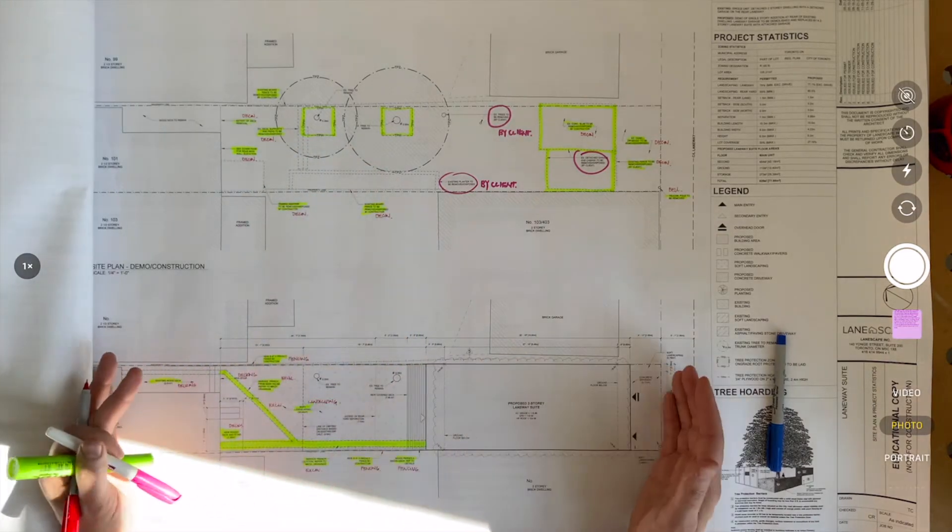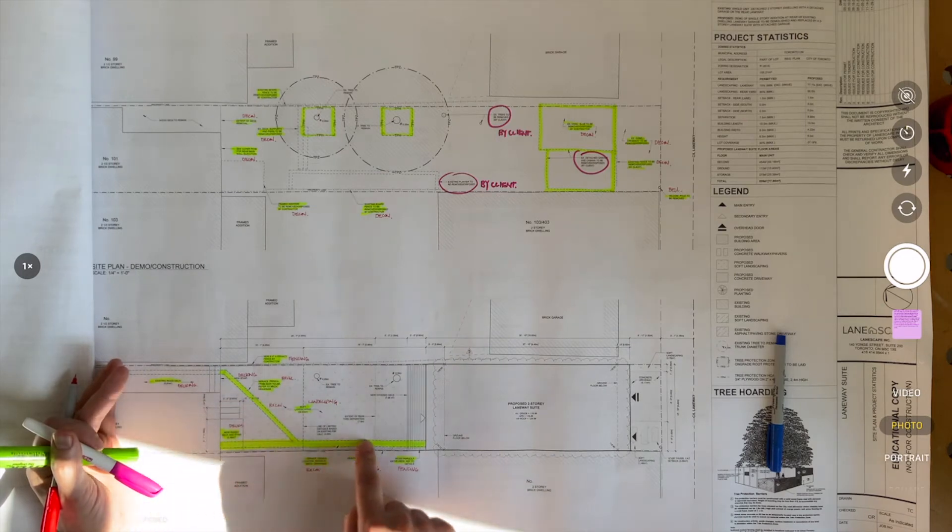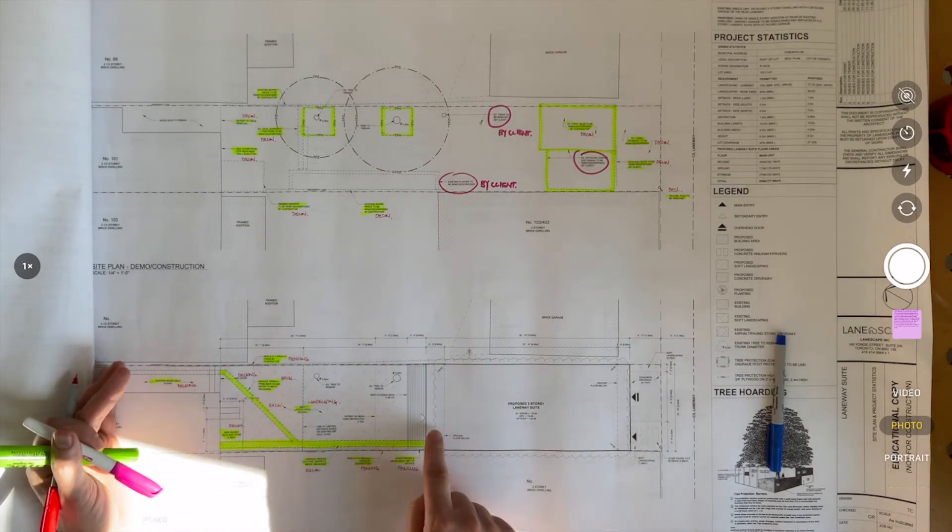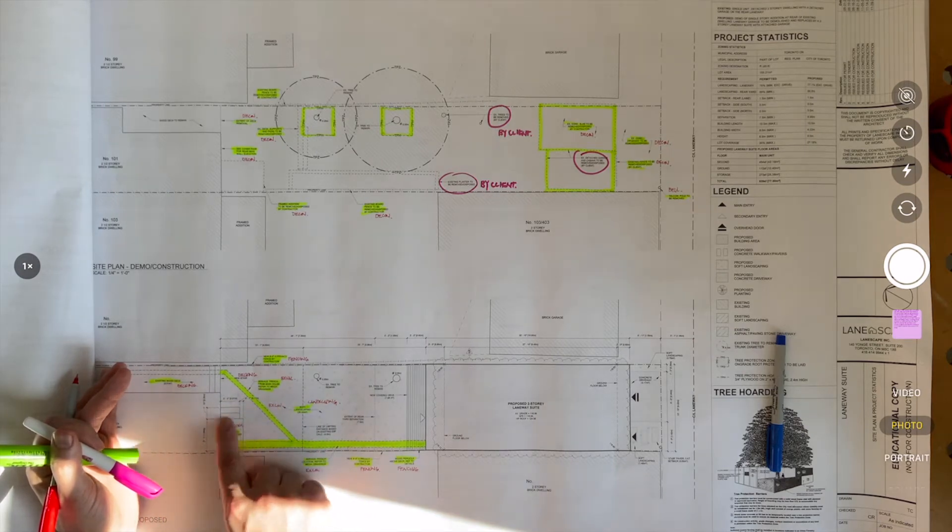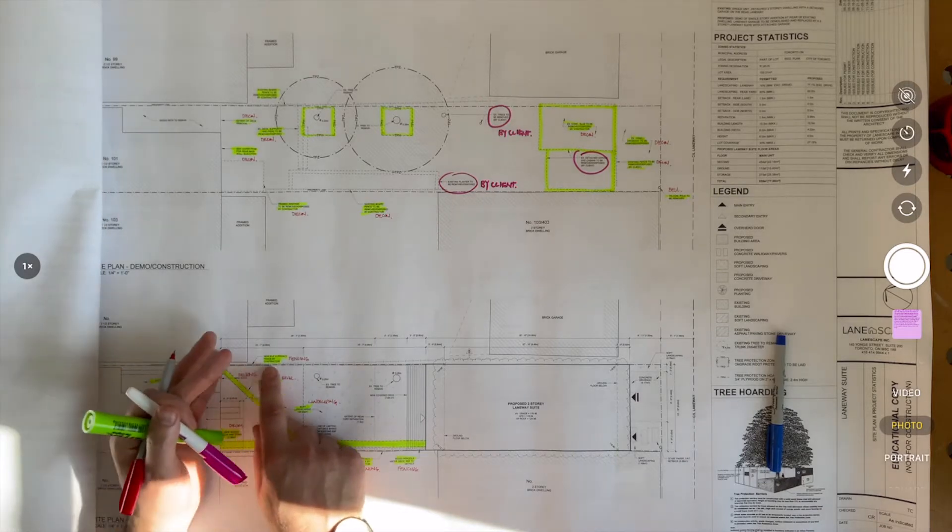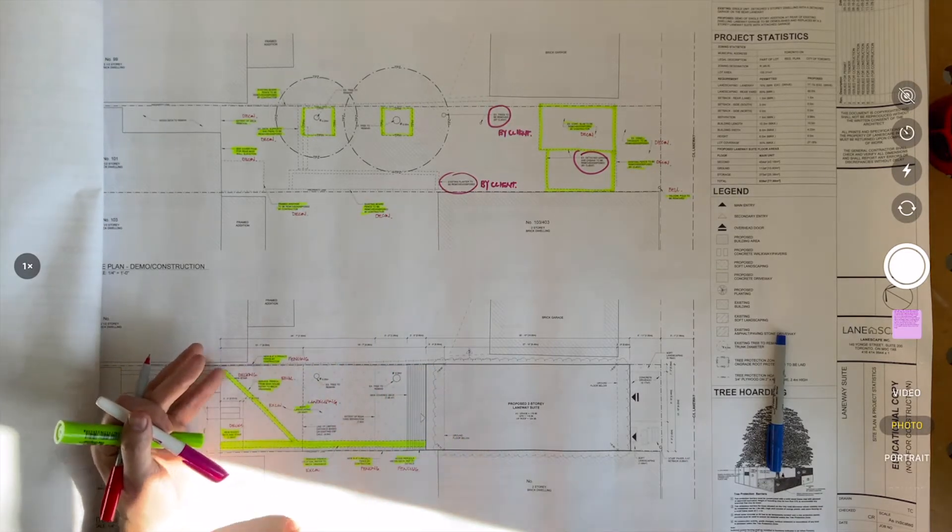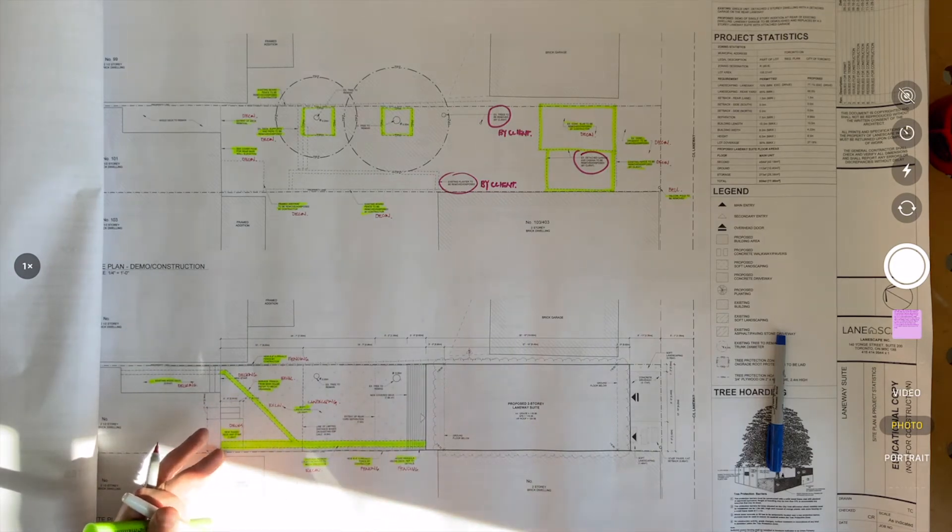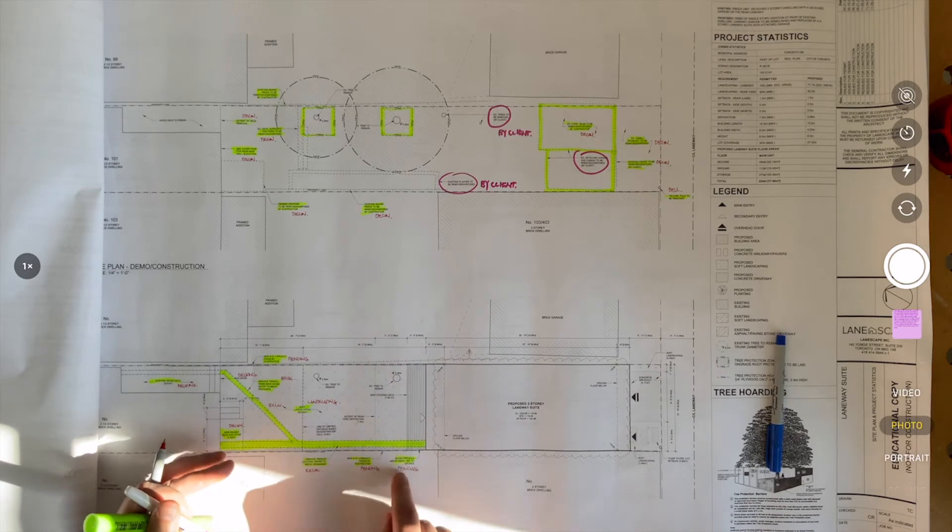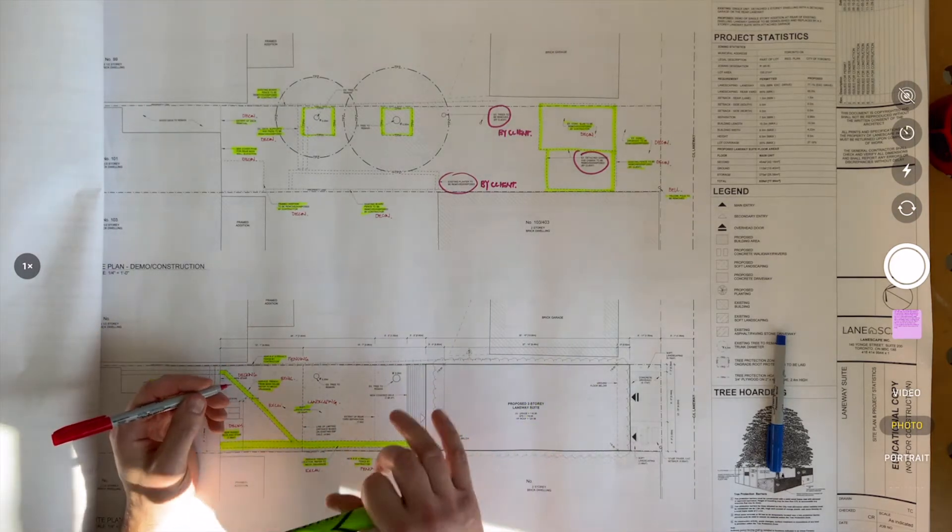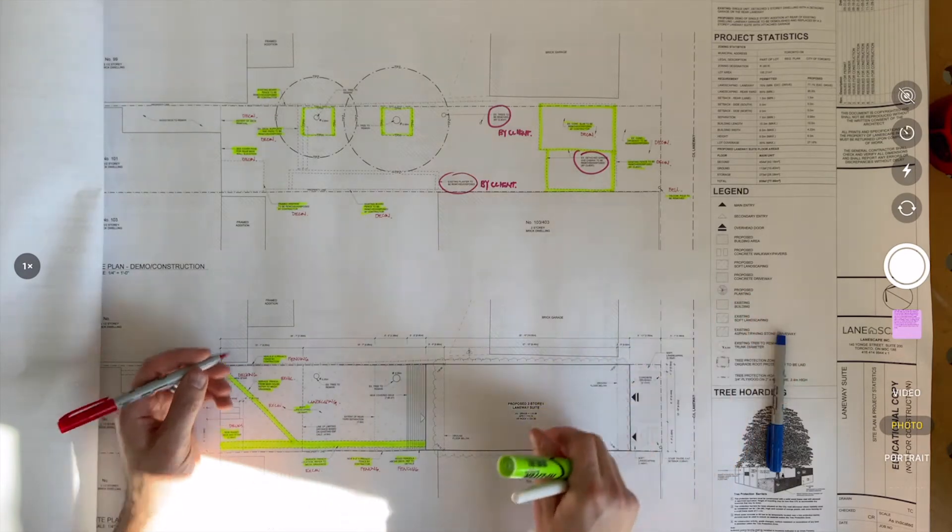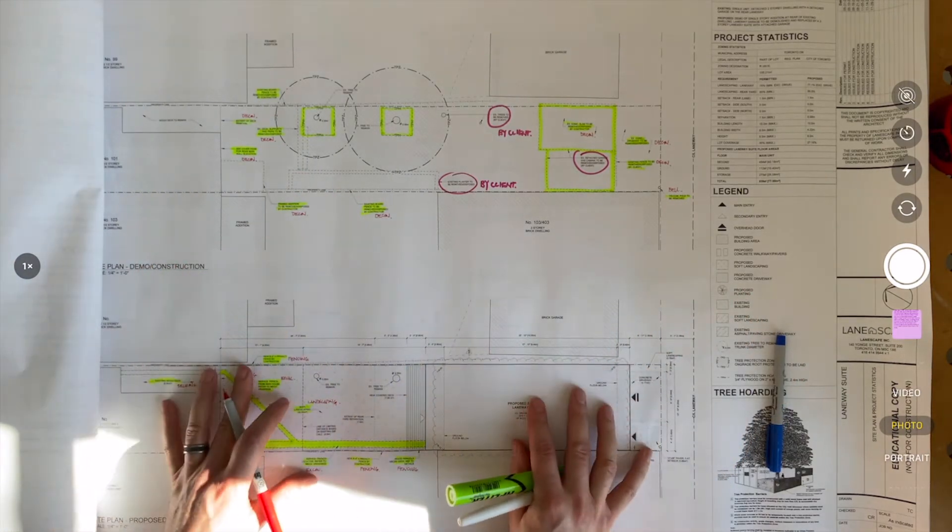As we get to the proposed site plan, I've also made some notes. I have to excavate my trenching to get my services back to laneway suite, and that is under excavation. I'm constructing a new set of stairs up to the existing house – that's under decks. I have to rebuild the section of fence here, that's under fencing. I have to rebuild the fence on this side of the property, also under fencing. So by highlighting and indicating which category, when I go through my estimate sheet, I can simply go through and as I write it with the area, I can check it off to make sure I've covered everything on this plan.